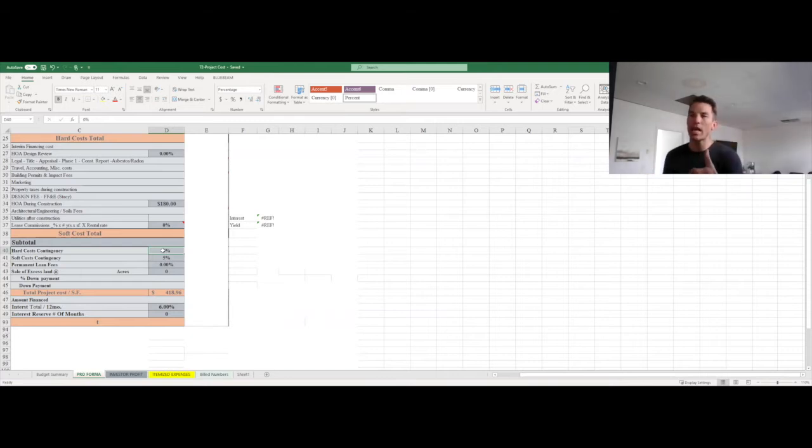And then at the end of the day, every category, if we don't spend that extra 5-10%, we just keep moving those down. If something happens halfway through the project, don't worry. We have the money from excavation or concrete to finish that, to fix it, do whatever it takes. We have that money buried in there, and it's not going to be a cost out of the owner's pocket because they already assumed that cost. However, even better, if you work your way all the way through the project, everything goes well, and you can hand the owner back and say, hey, your job cost this, we bid you out at this, and here's a chunk of change back because we saved you money.